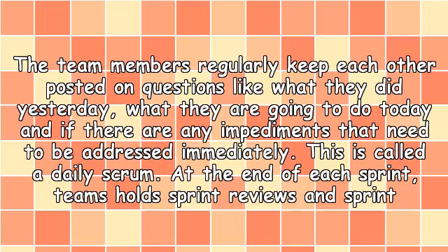The team members regularly keep each other posted on questions like what they did yesterday, what they are going to do today, and if there are any impediments that need to be addressed immediately. This is called a daily scrum. At the end of each sprint, teams hold sprint reviews and sprint retrospectives.